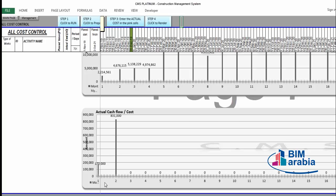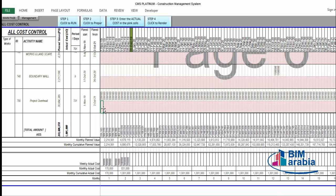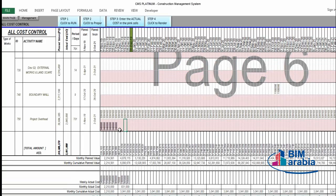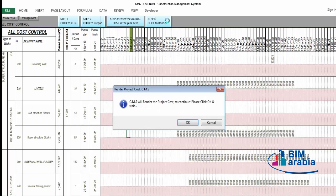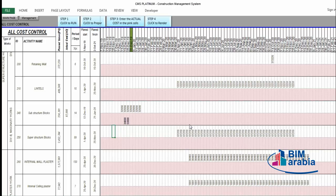We also have overhead expenses — enter monthly expenses for items like supervision according to your actual expenses. That is the actual cost until this month, the 31st of December, which is the date of the report. Then go to step four and click to render. The project overall cost report is now ready.